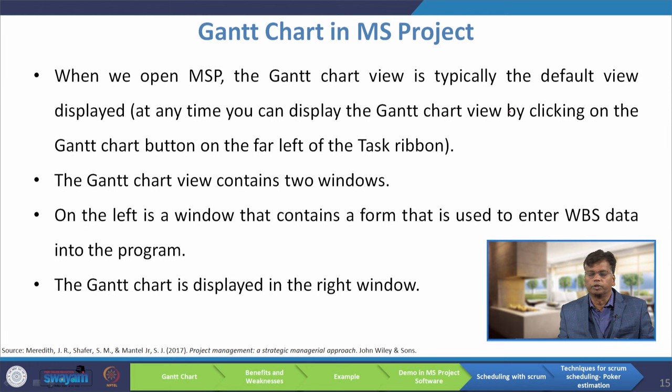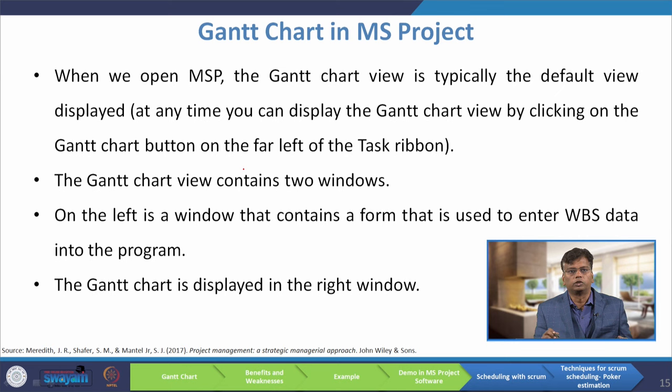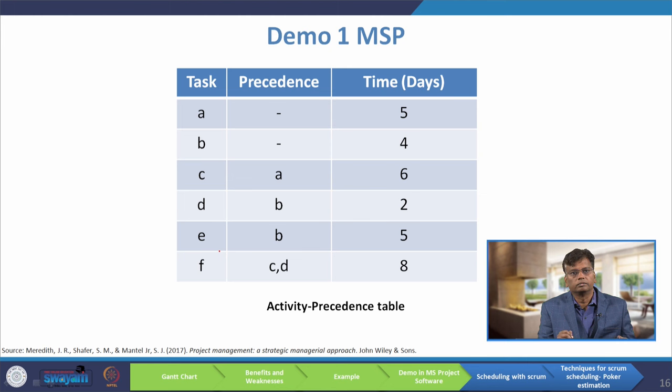Now I will explain how to use the Gantt chart in MS Project software. When you open MS Project, the Gantt chart view is typically the default view. The left window contains a form for entering work breakdown structure data, and the Gantt chart is displayed on the right. I have taken a sample problem with activities A, B, C, D, E, F, their precedence diagrams, and time durations. I am going to construct the Gantt chart for this problem.